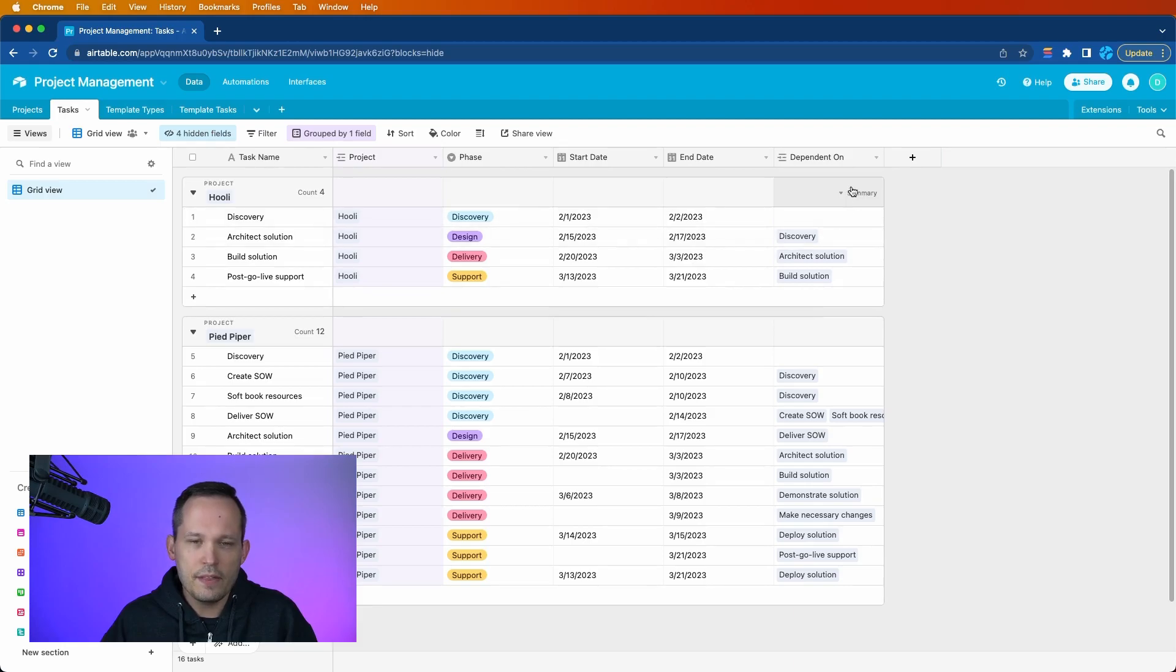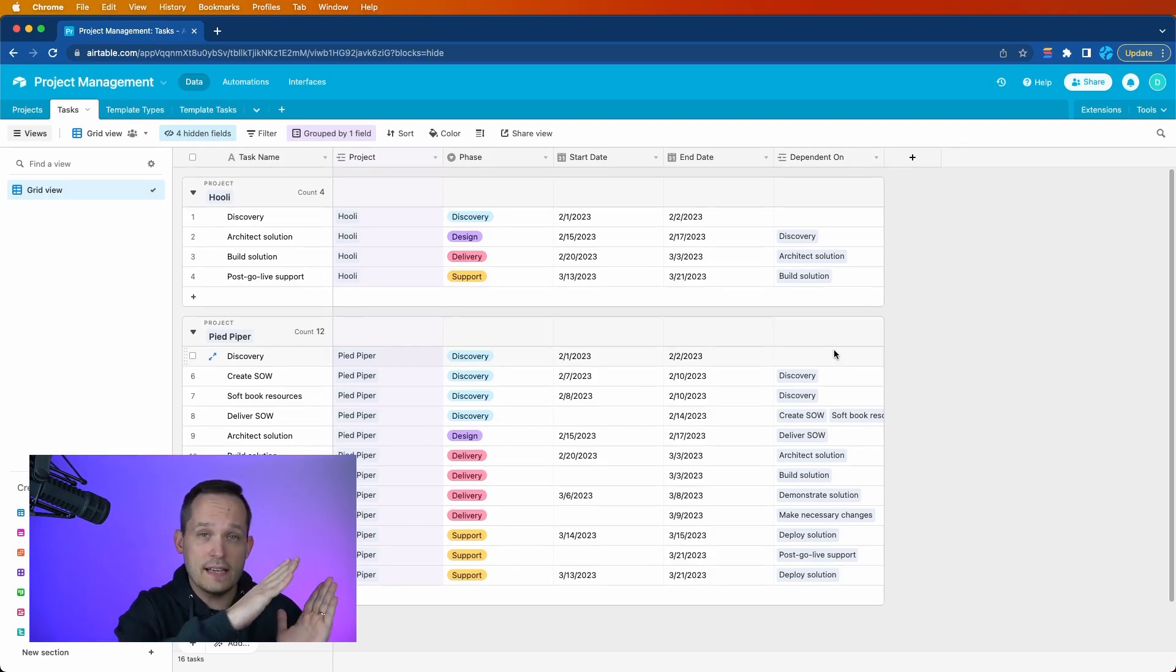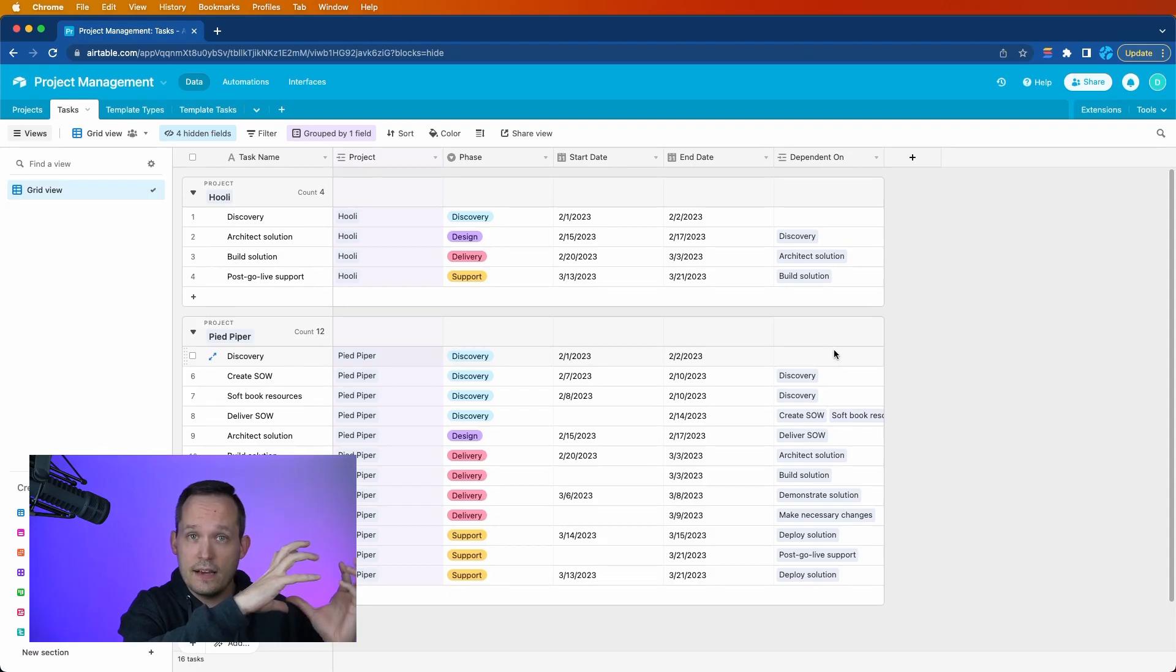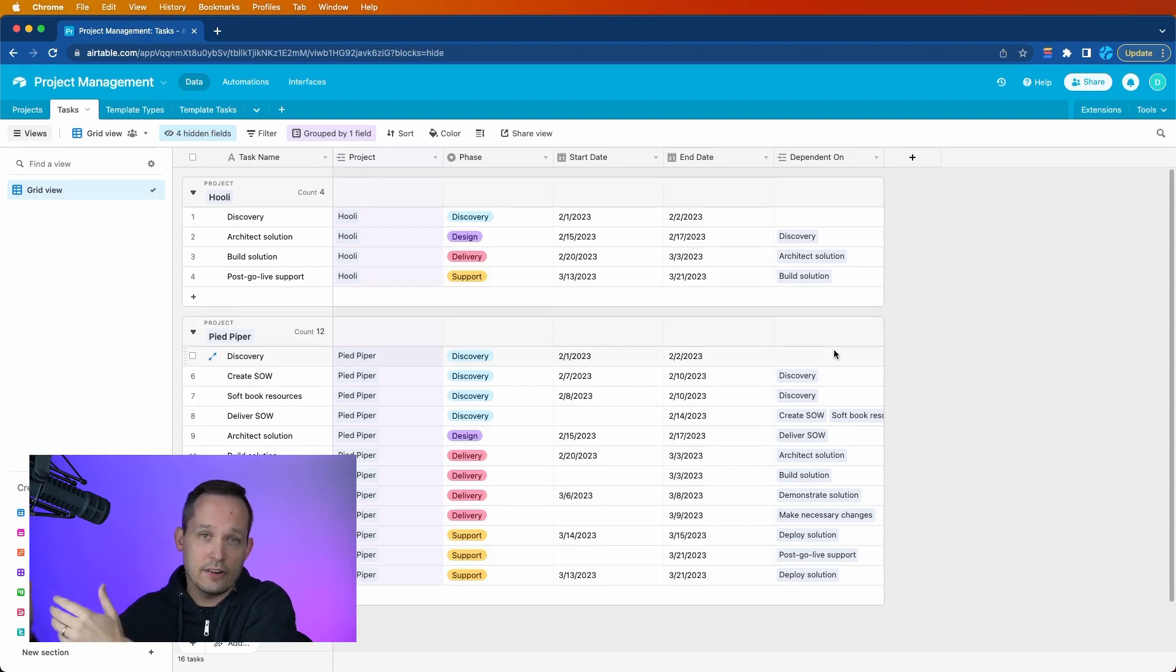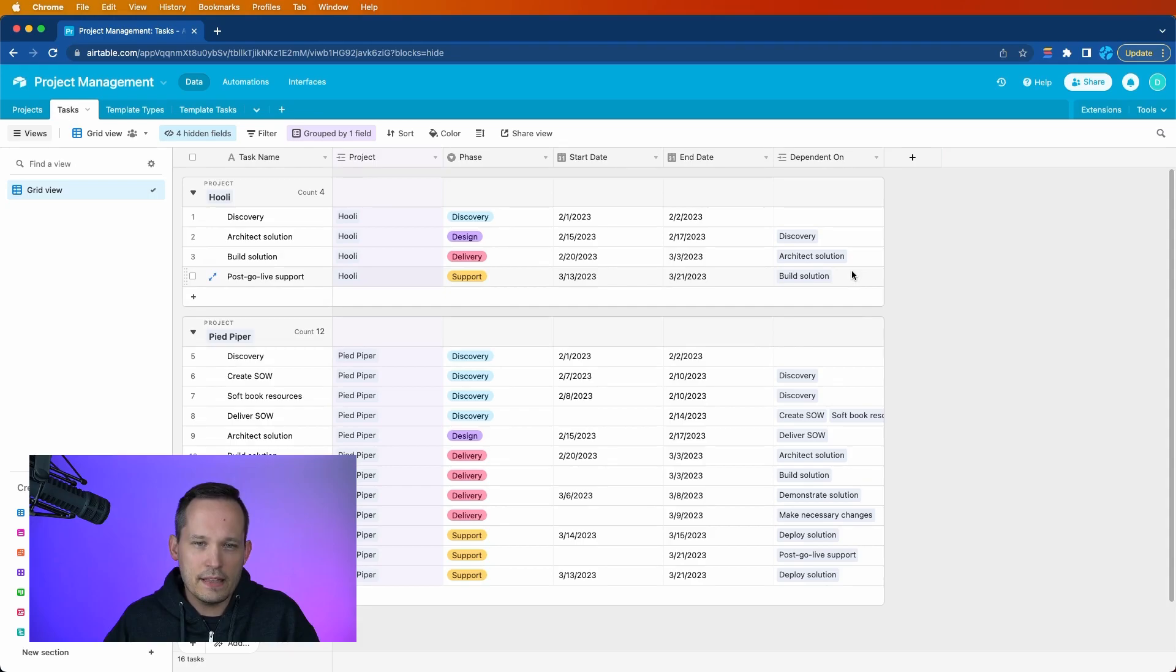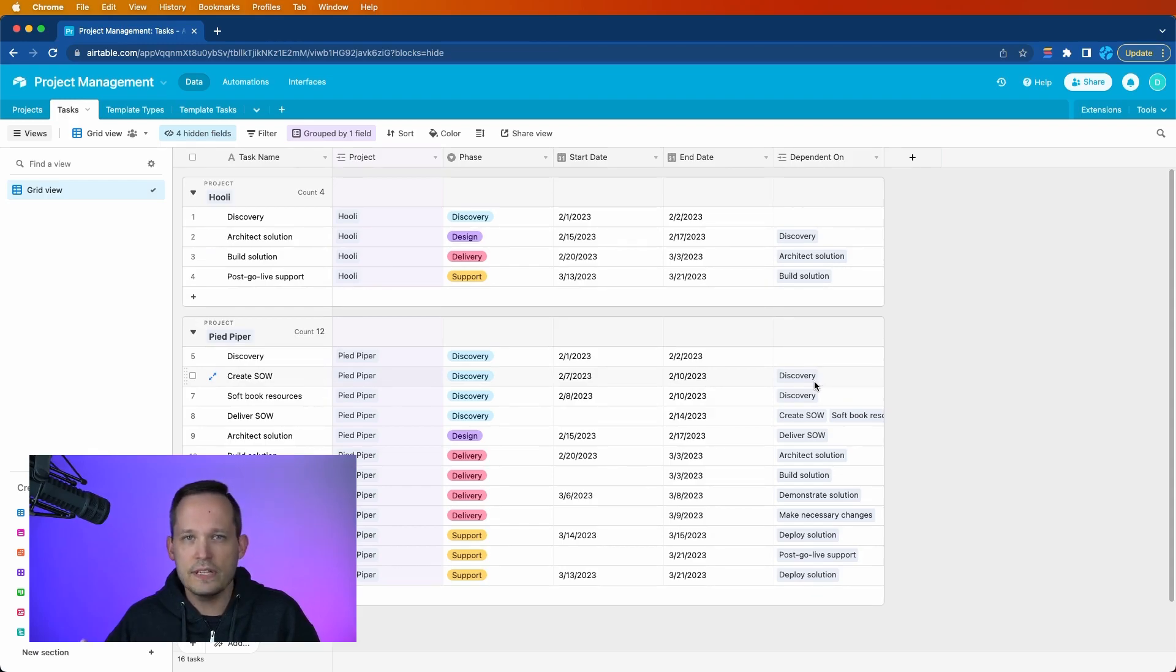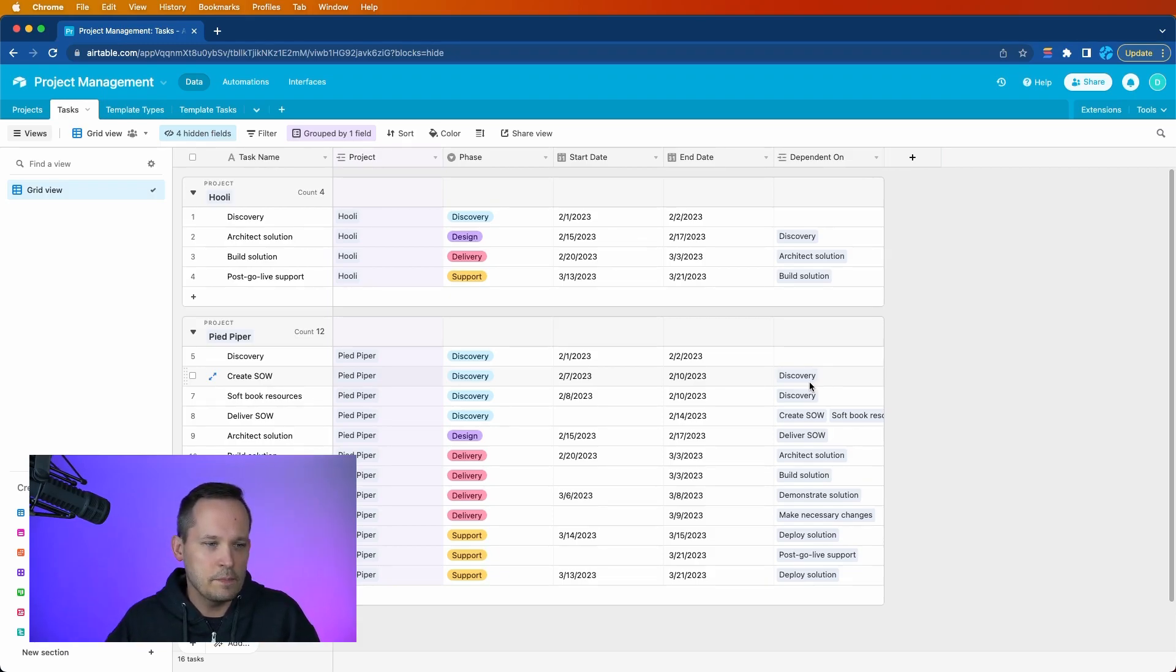The other thing I'll say is that this field, whichever you prefer, you can think of it. You can either think of the predecessors, the things that this task is dependent on, or you can think of its successors, the tasks that are dependent on the actual tasks that you're on itself. I typically think of the predecessors. So I called this dependent on. If I look at a task, it is dependent on this other task. But you'll see in a moment when we configure it, how you can look at it either way. So it's really your personal preference.